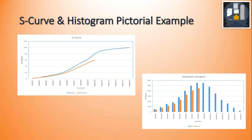Here is a pictorial example of the S-curve and histogram. On the left side we see the S-curve: the X-axis shows the timeline in months, the Y-axis shows cumulative percentage progress. The blue line is generated from the baseline (the planned curve), and the orange curve represents actuals as we progress. As we can see, the orange is below the blue curve, which means detailed engineering is behind schedule.